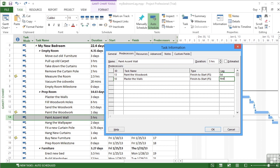The difference here between the D and the ED, if I put four days, that's four working days. And if we happen to hit a weekend, that's two days that we lose. Well, the plaster is still going to dry over the weekend. It's not going to think, well, it's Saturday and Sunday, let's stop drying. So I'm going to put E days. So that's four elapsed days.